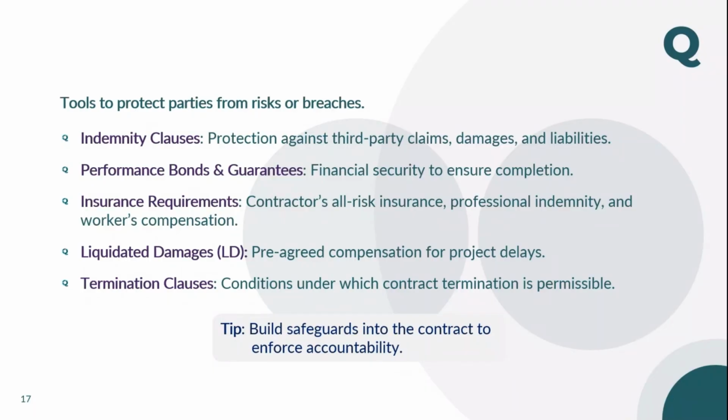That means you need to have a performance security, maybe advance payment mechanism, retention, retention guarantee and security, and DLP period coverage mechanism, collateral warranties, then warranties of manufacturers. All these things should be in place.